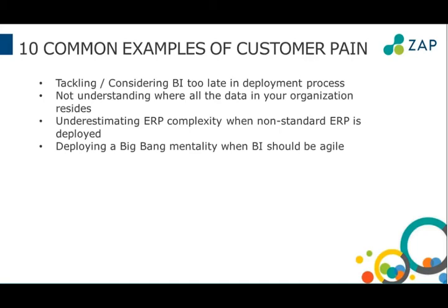The best thing with BI is to identify 5 or 6 outcomes that the business really needs, get those done in 4, 6, 8 weeks, get them published out to the business, get the excitement happening, and go from there. That pain there, if you don't do that well, will cause more problems for both the organization and the individual, and anything else I can think of.